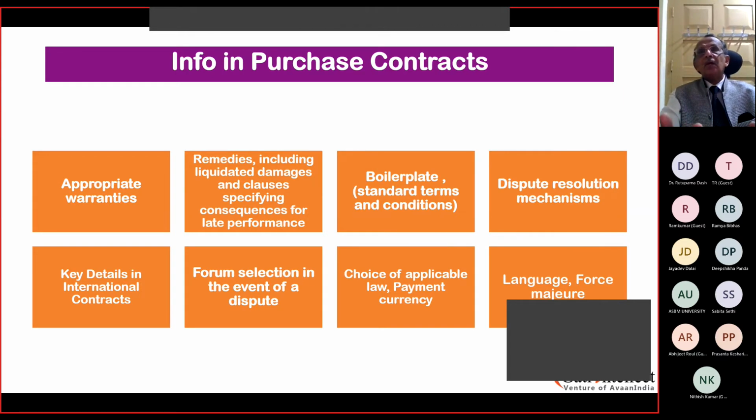There can be disputes. So what I always teach is, you should never accept boilerplate terms just like that. You should tell the vendor, we do not accept boilerplate terms without specifying all the charges which are applicable. Charges mentioned in the invoice will only be accepted. We do not accept any hidden charges nor the boilerplate in general.